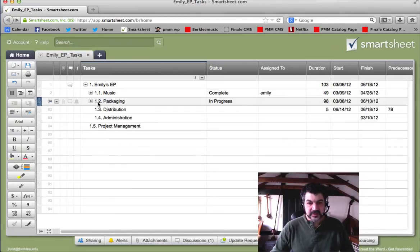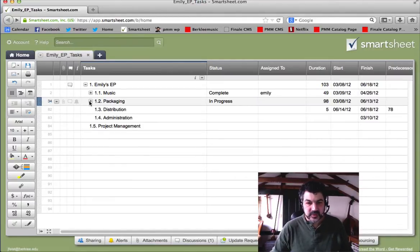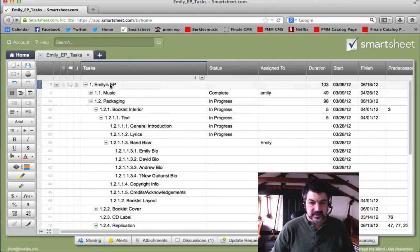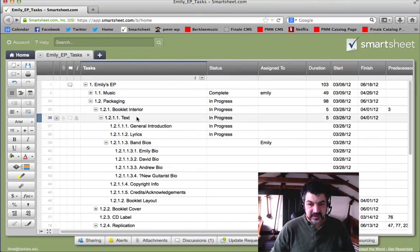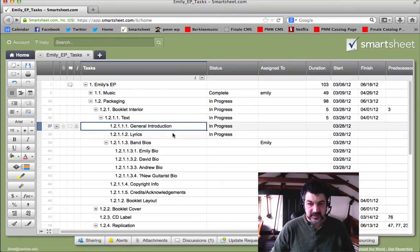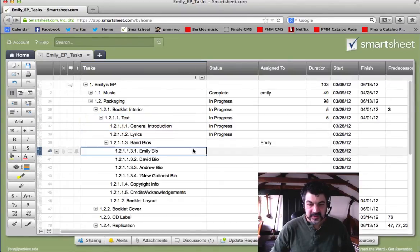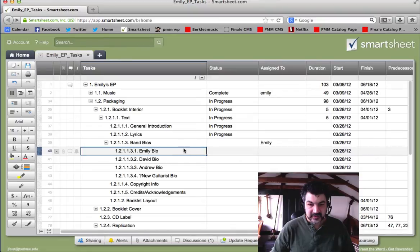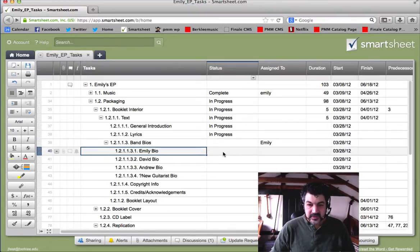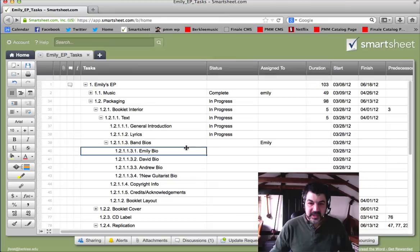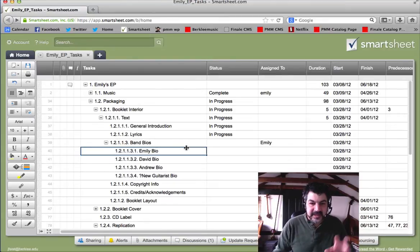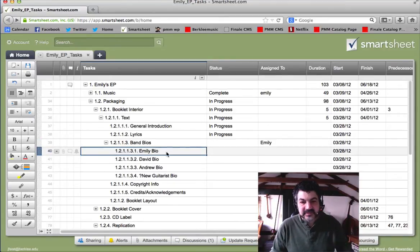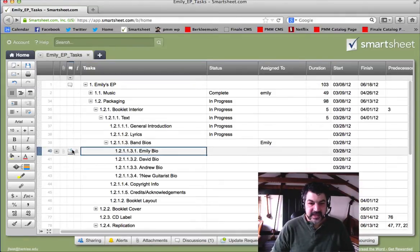So we set this all up with our project components, and when we're ready to work on some dimension of it, so let's say that we're going to start working on the packaging, booklet, text for the booklet. We want to start getting this stuff all done. Maybe it's time to start working on the band biographies. So when we get to the final work packet that we want to organize the WBS to, the next phase of it is going to be to add tasks, to come up with a task list.